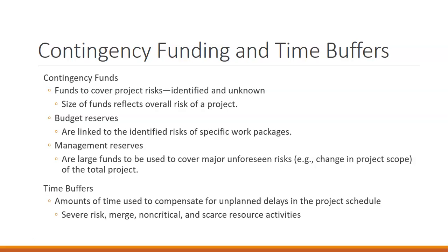Time buffers are amounts of time used to compensate for unplanned delays in the project schedule. Then we want to look at those merge activities, non-critical activities, scarce resource activities, and those activities that have the highest risk.